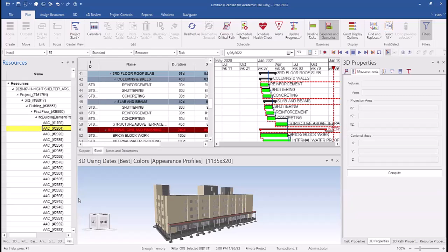Can the user manually update the progress? Yes, we can, and the user does it if required. One, you have the schedule percentage, which the system tells you, that this much work should be done. The other is the actual progress, which you update as per the site.